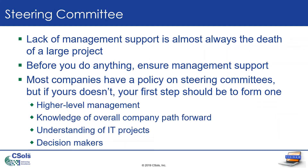The steering committee is a big part of understanding how all the pieces fit together and whether everyone is on the same page. One of the pillars of project management is management support, and the lack of management support is almost always the death of a large enterprise-level project — which LIMS and ELN will almost always be. Before you start any major planning or put in any significant effort, you want to make sure you have management support, and you should set up a steering committee.